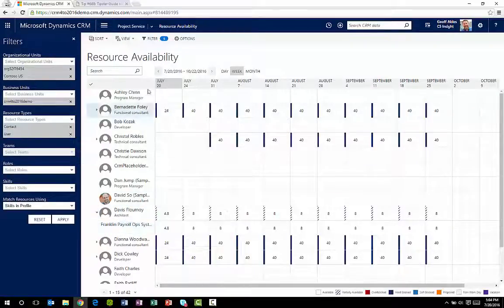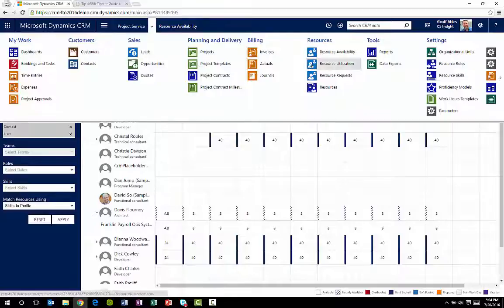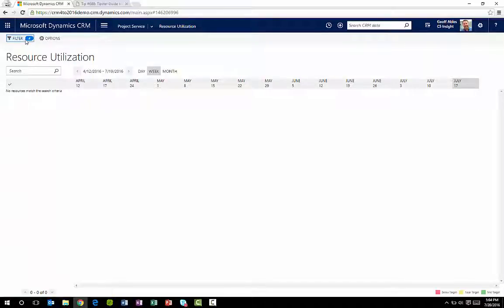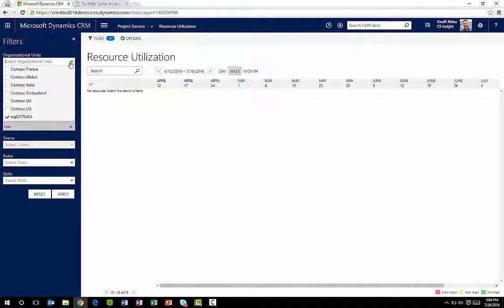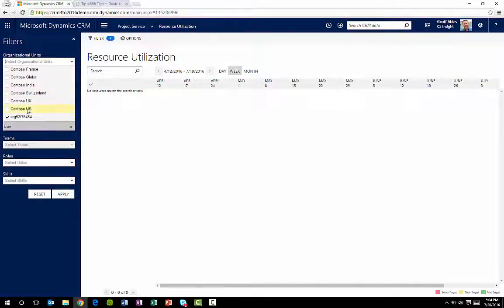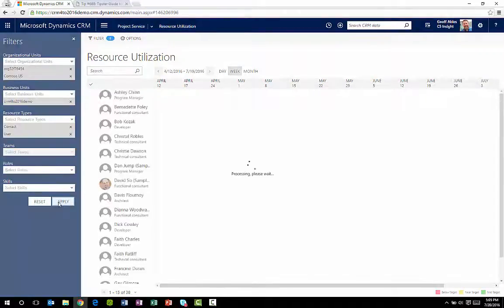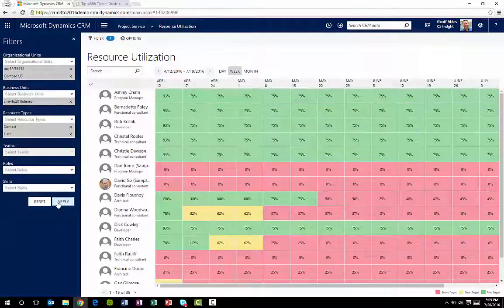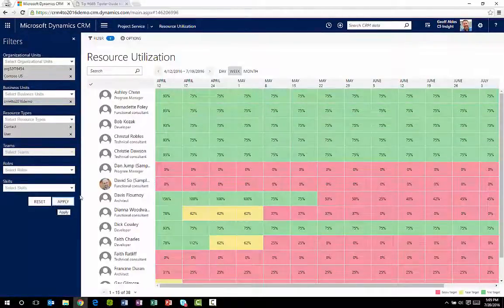Any experienced project manager knows that committed time doesn't always convert into the actual utilization rate. I love that I can also go check what actual utilization was. I can see if some people are regularly over or under their projected hours, if certain types of projects are not being estimated well, and I can give feedback to our sales team so that we constantly improve our accuracy.